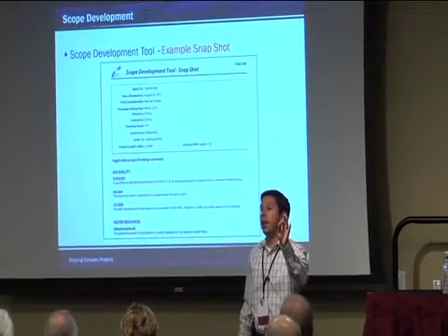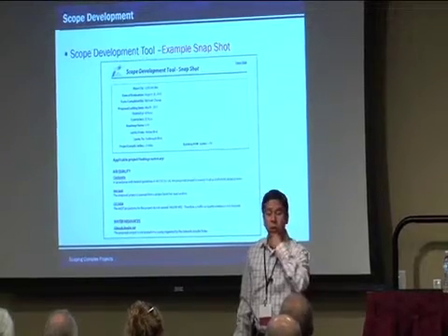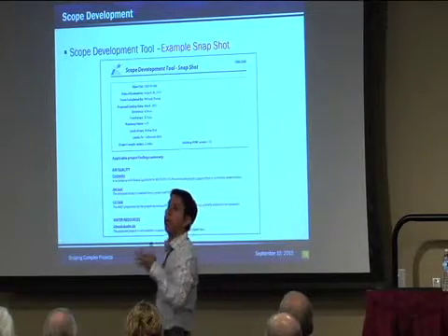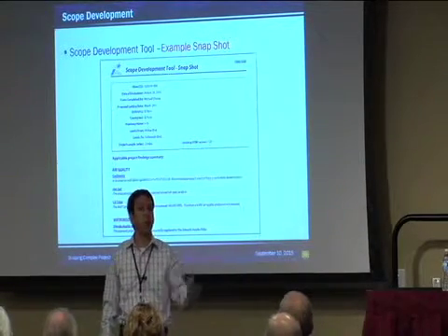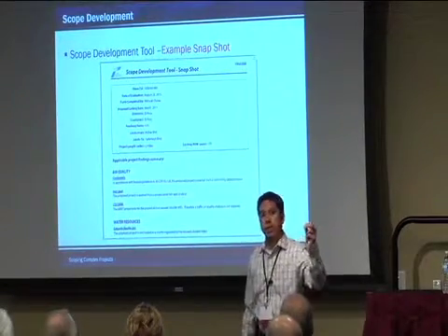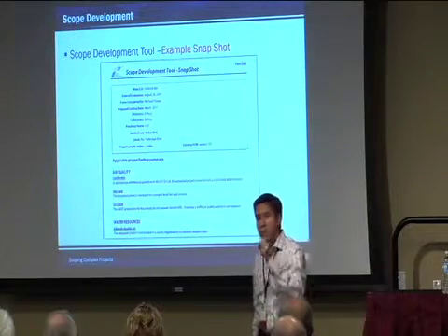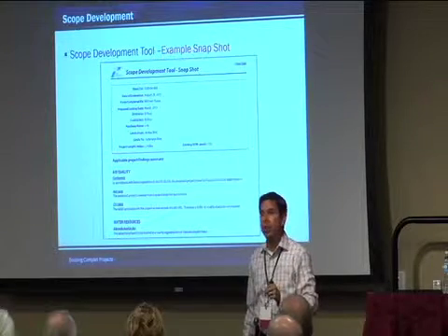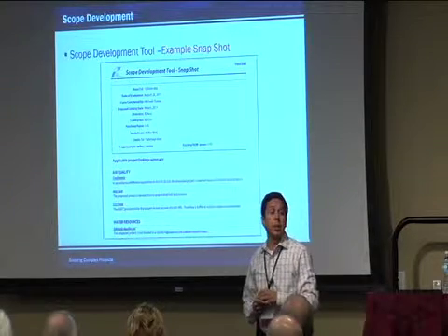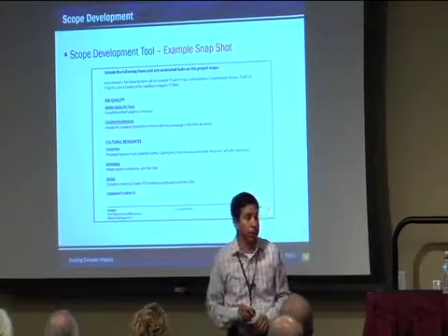And this tool is available online, so it could be used at the district level prior to identifying a consultant. I've been told by some consultants it's helped them identify what needs to be done to help with their proposals too. It's a tool that can be integrated throughout the process and used towards the end. If there's any kind of design change, you go back to the tool, pop in any changes you've identified, and it'll tell you if there are any additional items that need to be done, or if it takes away some items. So it's really a great tool, and if you get a chance, you can go play with it.